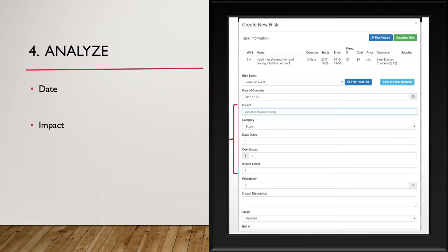The impact can be either impact on the quality of the project, a schedule problem, a delay, or a cost overrun. Include also an estimate of the likelihood that this risk is actually going to happen, and as well assign an owner to each risk. This person is responsible for monitoring the risk and preparing mitigation alternatives. As we know in management, anything without an owner doesn't get done. This analysis forms the heart of the risk register content.